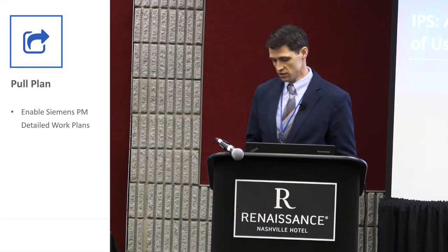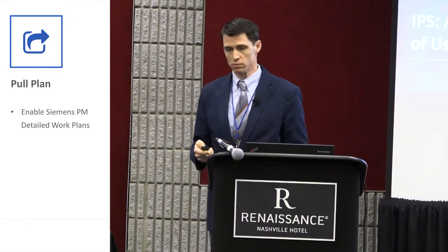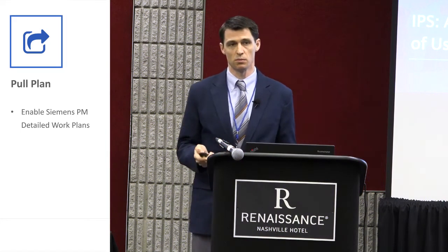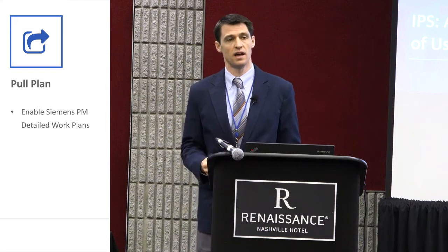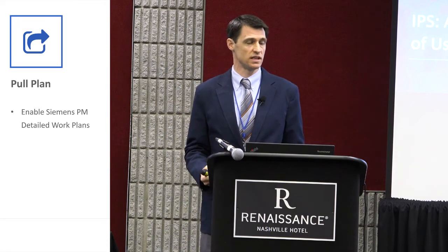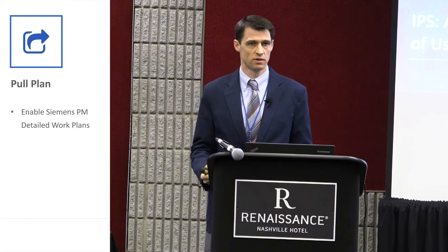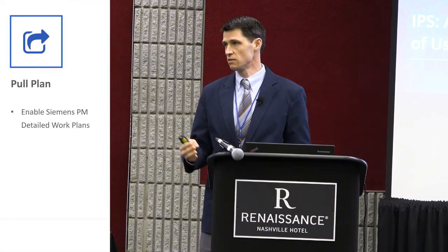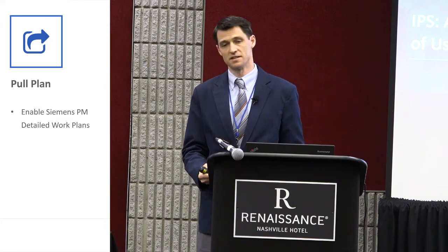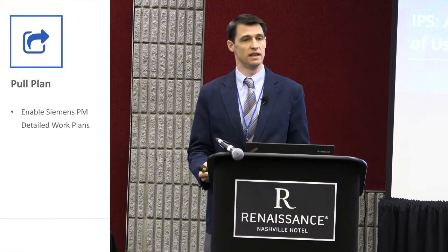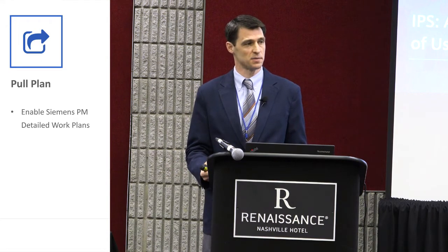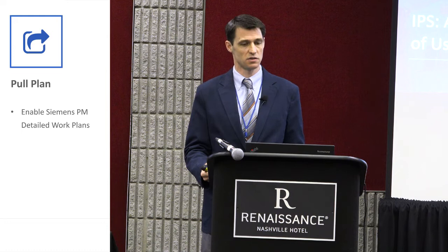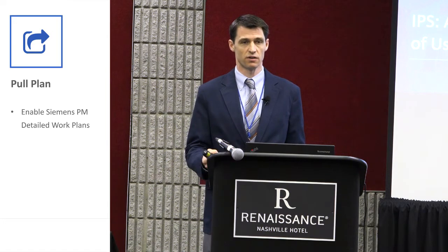Pull plan discussions. We're kind of using pull plan and work plan here independently. We use a pull plan session to help the project managers on this team figure out what they need to do. The project managers on most jobs are stretched very thin. Some of them still have their day jobs in addition to this mega expansion, and they are responsible to have the site ready for construction.